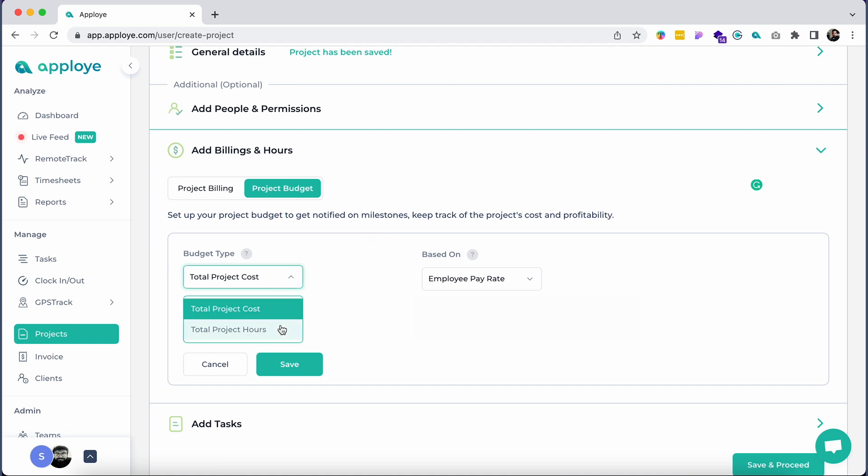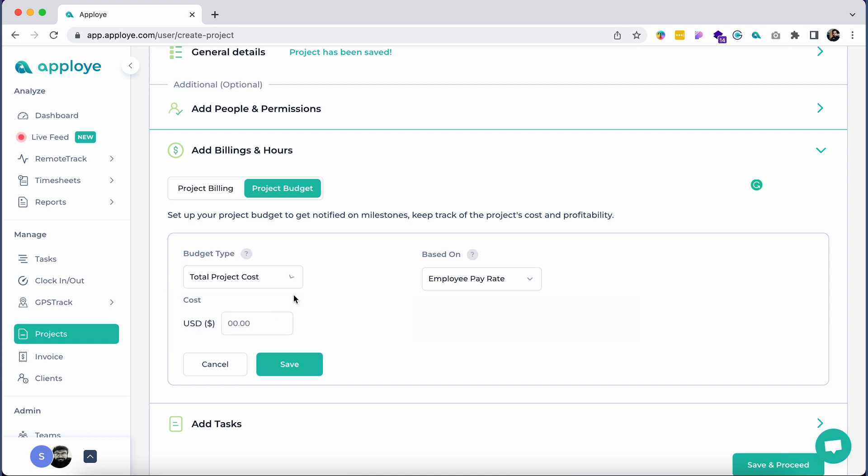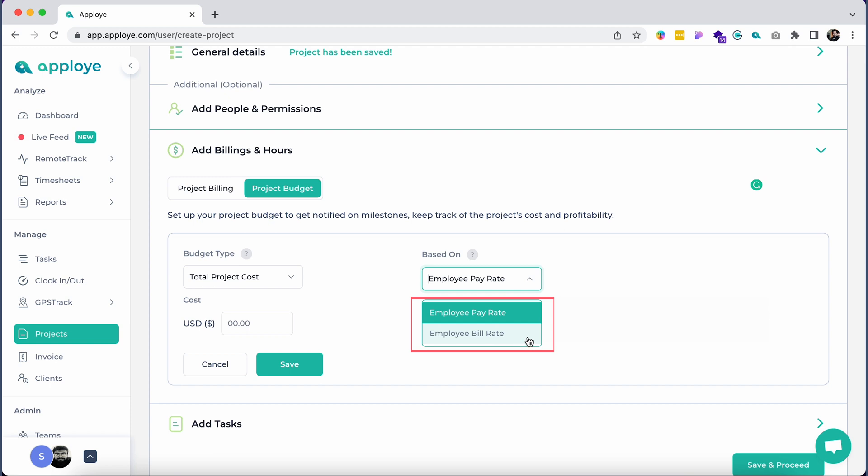You can set a project's budget by total project cost or total project hours. Please note that total project cost can be set either by employee pay rate, which is the actual hourly rate you pay your employees, or employee bill rate, the hourly rate that you would like to bill your client for that particular employee's work.